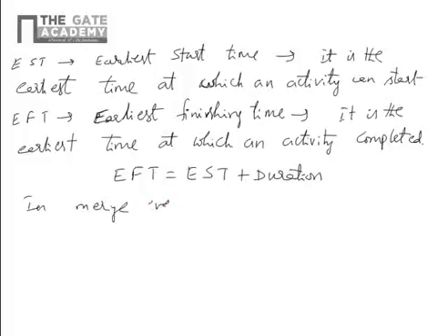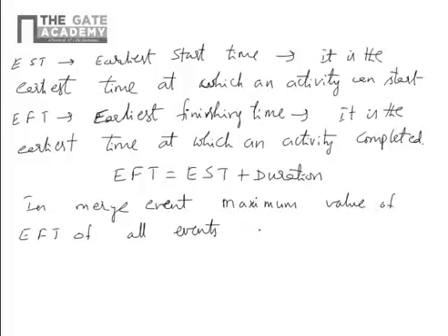In a merge event, EFT is calculated for all paths, and the maximum value of EFT of all the merging activities is taken as the EST for the subsequent activity.